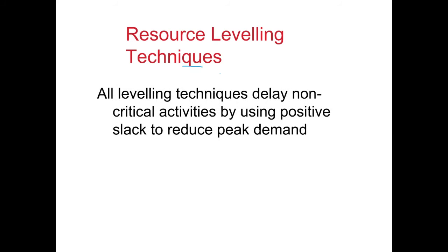Now there are different types of resource leveling techniques which are used. In real life situations we work with projects with a fixed amount of resources, so we have to prioritize which activities would get a resource, and for that there are different resource leveling techniques which are used. So all resource leveling techniques essentially delay a non-critical activity by using positive slack to reduce the peak demand.